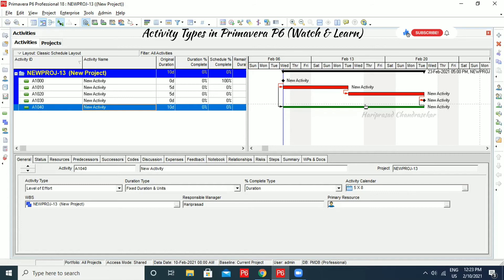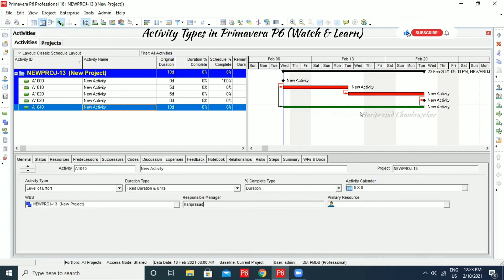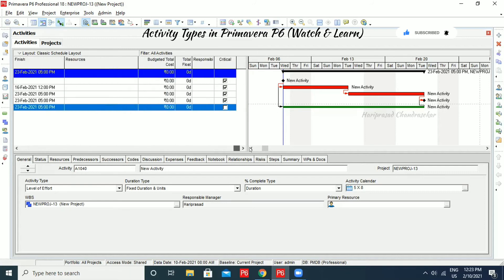So that is what Level of Effort is. Normally for a particular activity, we need some supervision or invigilation. You can input this as a Level of Effort activity and assign a responsible manager or someone like that, and that person will take care of those activities. The total duration depends on all activities in between. Even with a long duration, it won't be on the critical path because it is not a regular activity — it's just a Level of Effort. See, it is not on the critical path at all.